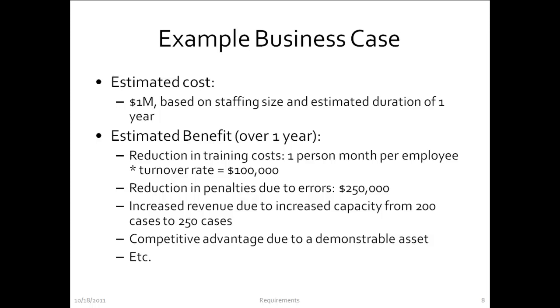So the owner of the company essentially asked me, how much do you think building a system like this will cost? And I gave him an answer something like, well, you'll need a project manager, you'll need a DBA, you'll need probably 3 software developers, you'll need 1 software architect. These folks will have to be full-time for the first year, so you have 5 people full-time.